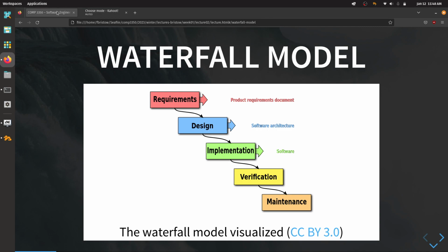The architecture team starts architecting, and they realize there's something missing in the requirements. There's this part that's like a question mark, question mark, question mark. I don't really know what to do here. The architecture team now has to pass it back to the requirements gathering team so that they can go back to the client and say, hey, our architecture team figured that there's something missing here and we don't really know what to do. What do we do?